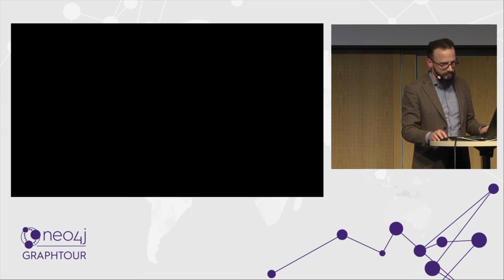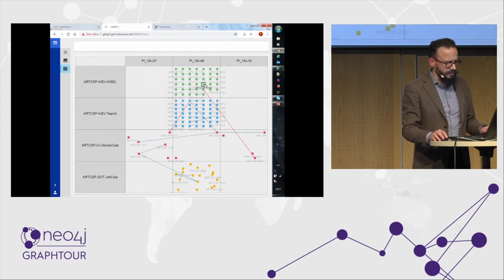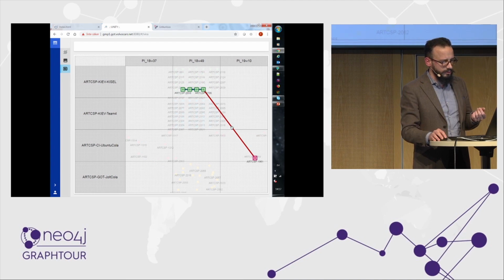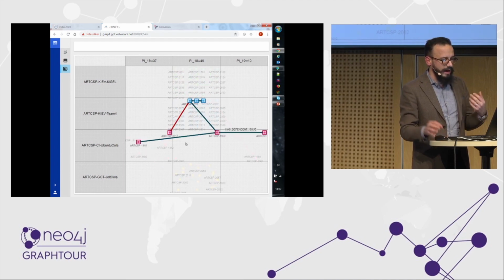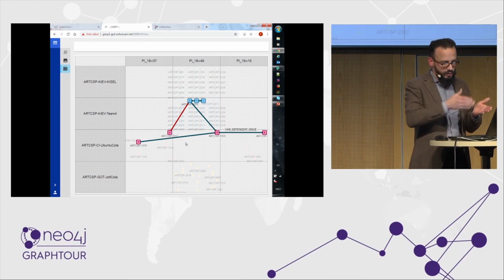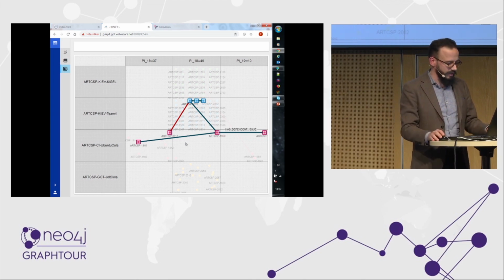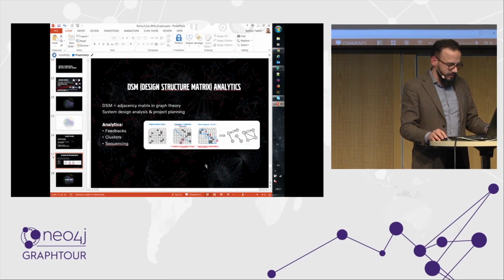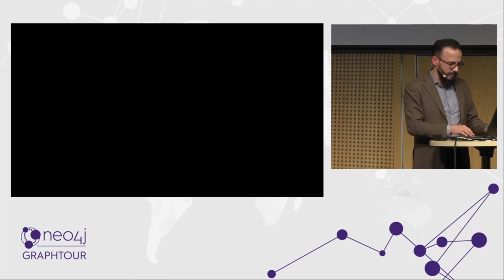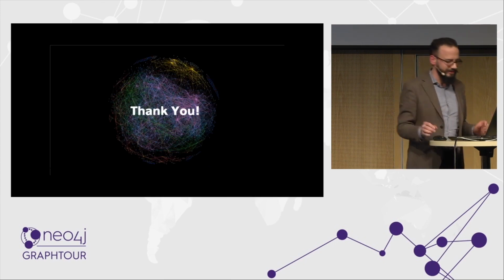And this is something we've started integrating into our Graph Intelligence platform in a little app, which is under construction now, but which is basically showing how those functionalities relate to each other, when we should develop them, in which PI, program increment, which is a period of 12 weeks at Volvo Cars, and which team should do it. So the loop is closed, nearly, let's say. Yeah, that was it. Thank you.